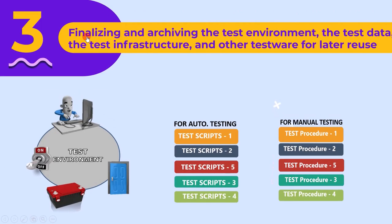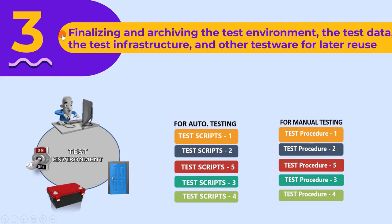The third activity is finalizing and archiving the test environment, the test data, the test infrastructure, and other testware for later reuse. To test a feature we need a test environment, which includes test setup, tools, software, test procedures, test scripts, and so on. After test execution, all these testwares are frozen and stored in a configuration management tool, so that we can reuse them based on the customer's request.